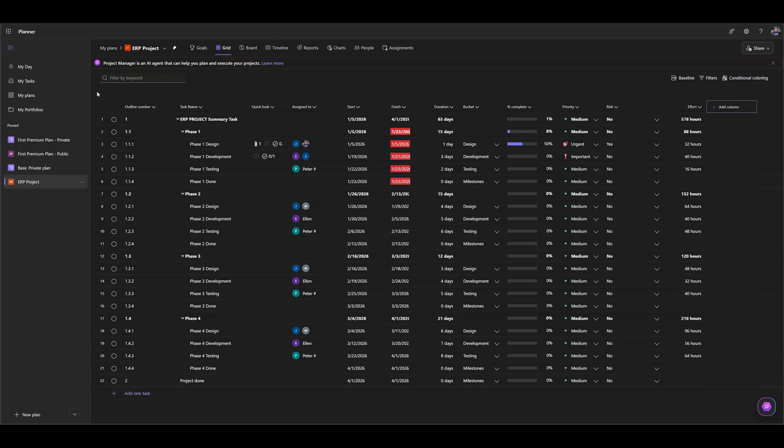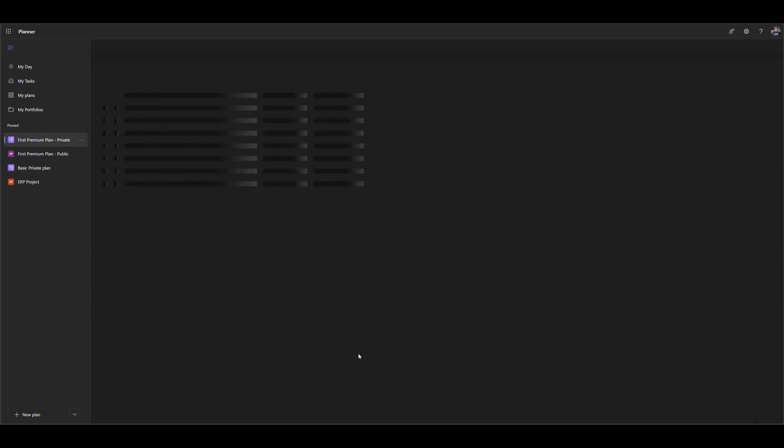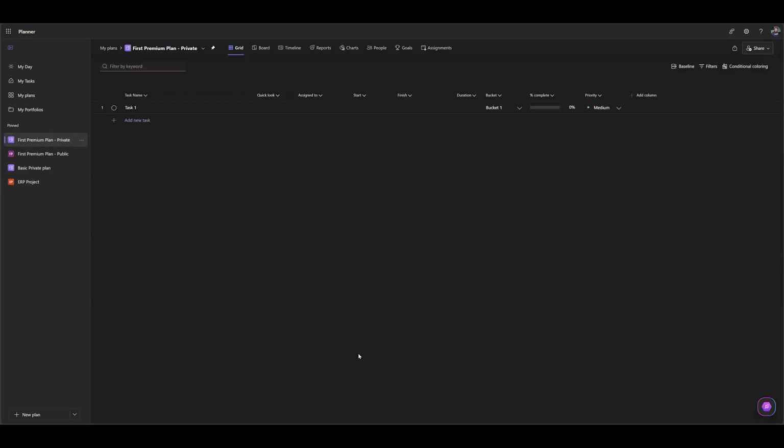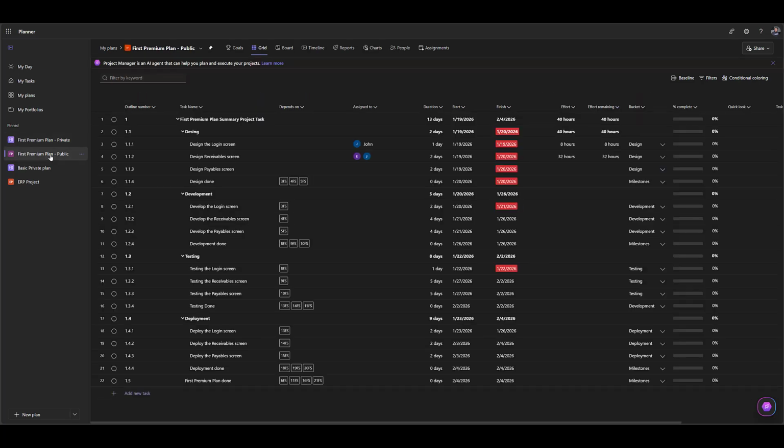576 hours. So to conclude this video, first of all, have a project summary task, then have all tasks which are grouped, and the group should begin with group summary task like design, development, testing, etc. It should be finished by milestone. At the end, you should have milestone for the whole project. You should make good dependencies, okay, and then assignment. And of course, put the right task in the right bucket, create meaningful buckets. So that's all.